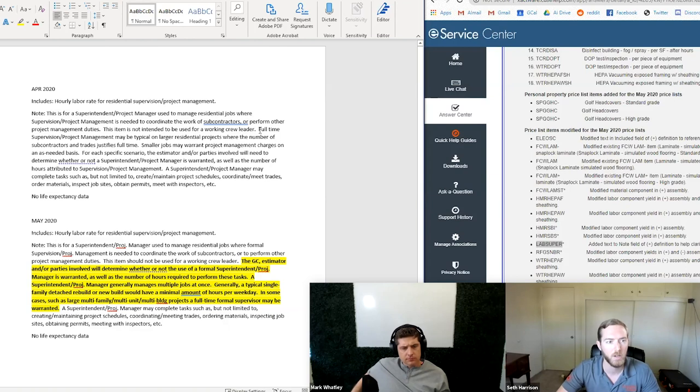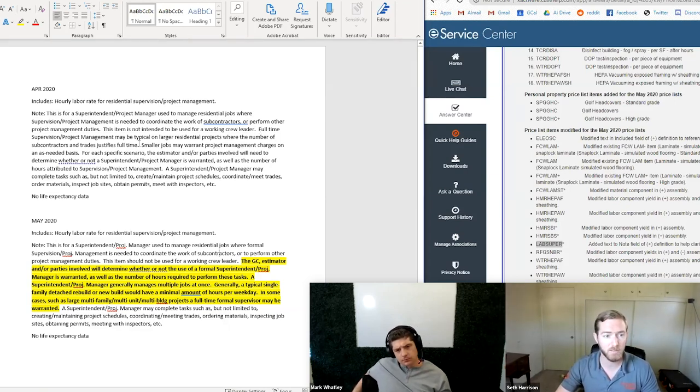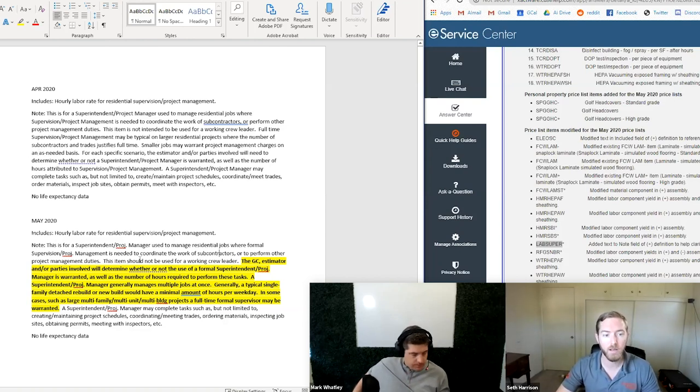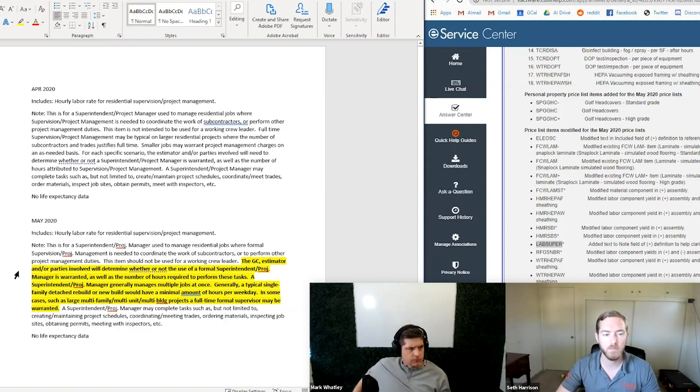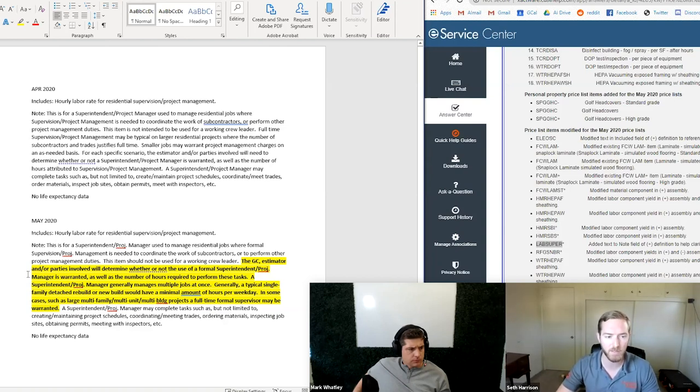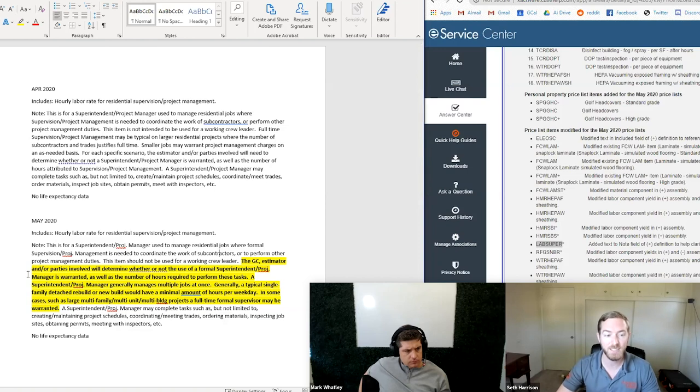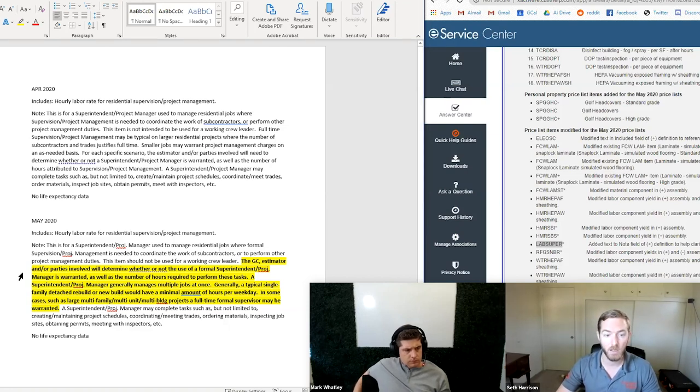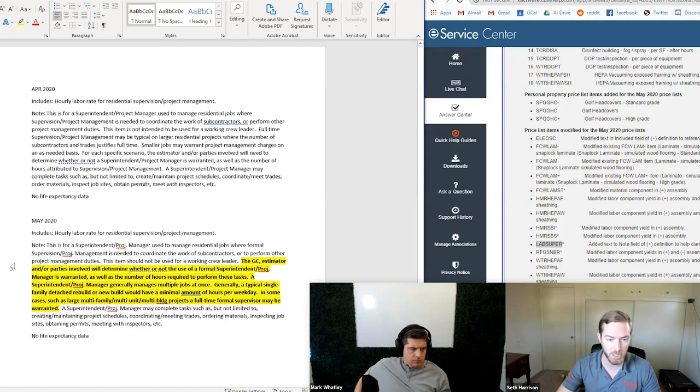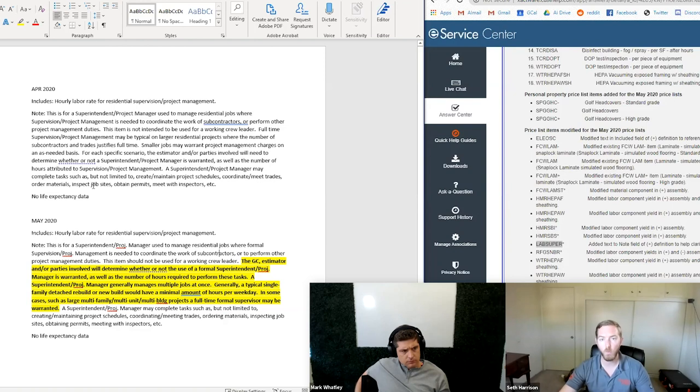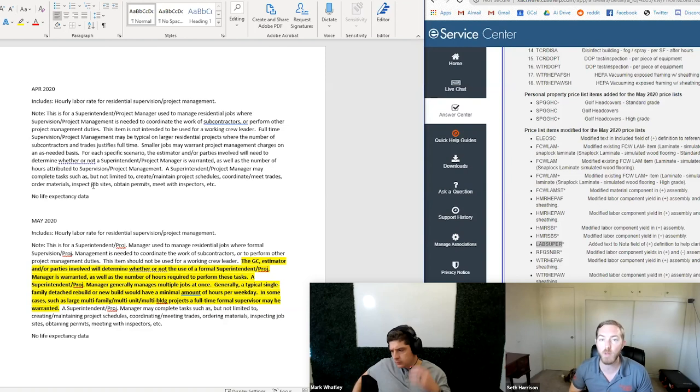So you'll see here in April, 2020 on the top, we have the additional item information note for L-A-B-S-U-P-E-R-R. This is residential supervision. And then down here is May. And the major text change that you'll see has been highlighted here in black and yellow and et cetera, so that we could highlight it. Just to briefly kind of give you a summary overview, the beginning hasn't changed much and where it ends at the, this item is not intended to be used for a working crew leader. It changes after that. It used to say full-time supervision project managing may be typical on larger projects, a smaller jobs may warrant project managers on an as needed basis. Now you have the GC estimator and or parties involved will determine whether or not the use of a formal superintendent or project manager is warranted as well as the number of hours required to perform these tasks. A supervisor or superintendent slash project manager generally manages multiple jobs at once. Generally a typical same single family detached rebuild or new build would have a minimal amount of hours per weekday. In some cases such as large projects, a full-time formal supervisor may be warranted. So what are your thoughts on kind of this text change and how this supervision line item is meant to be applied in property insurance claims?